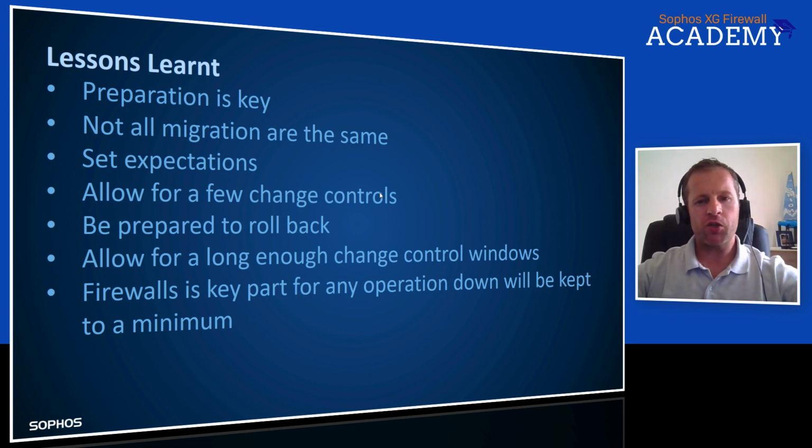So set expectations of a change window. Don't just take a half-hour window. Set yourself an hour or 2 hours for the change window so that you can properly prepare and install the XG and make changes as you need to. So know the environment and prepare properly, and then allow for a few change controls. You might not have a successful change the first time around, like we did. Be prepared to roll back.